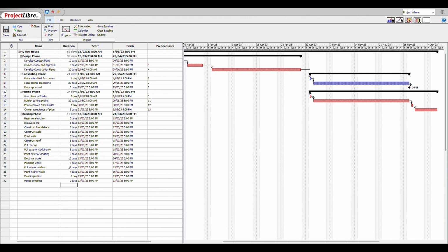Now, just as a word of caution, obviously here I'm assuming that duration and time to complete equals the same. So what that means is I could say, for example, that it's 5 days work to construct the foundation, but it may in fact take 10 days to do it because of resource availability or any other constraints. But we're simply assuming that the duration is the actual time that we're going to take here. And you can put in another column if you want to that separates those 2 numbers out.